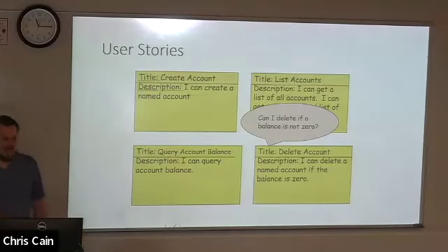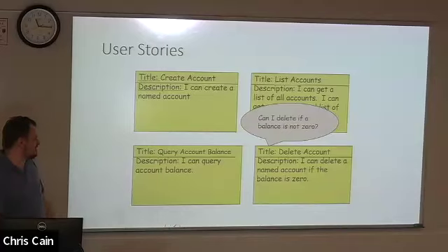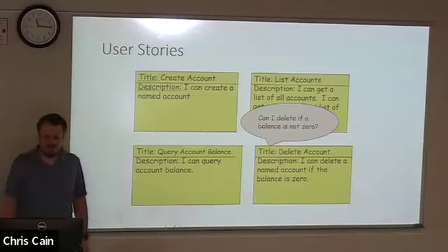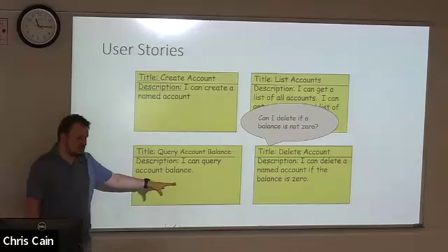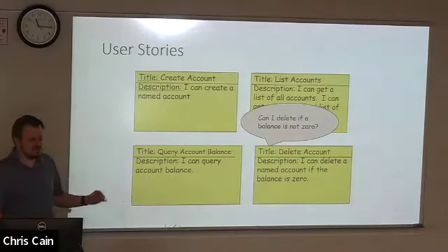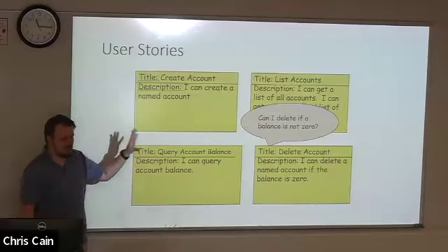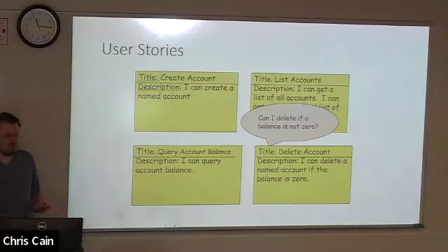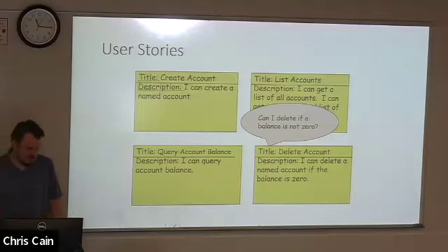So add some of that conditional logic into your user stories, because this is still a what. We're not specifying how this is done. But it is very important that we put some of the big problems that could occur in the user stories to make sure that when we refer to these user stories, we can start to create some technical requirements directly out of the user stories. We want there to be as little translation as possible between the user stories and making the next step that we're going to talk about.